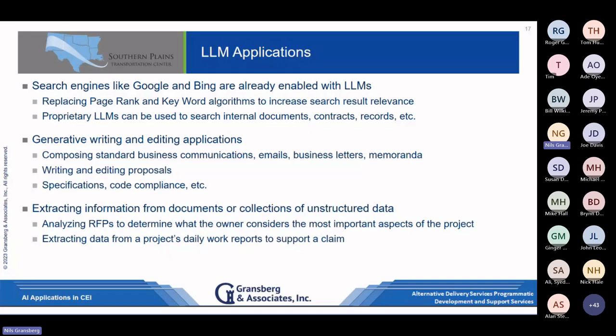Wasn't here. I had a claim that we did with a client several years back. They had a delay claim on a design-build project, a 6-month delay. They wanted $500,000 because they said the county had delayed them by holding up their permit. They'd been told they didn't have to do a slope stability analysis for this one feature, and then the county came back and said, no, you have to do that first to get the permit. So they had the 6-month claim.